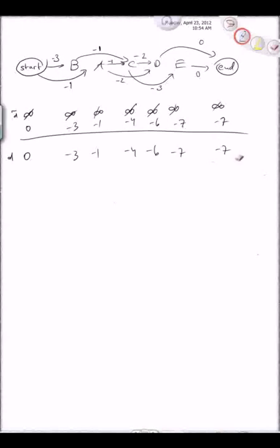But somebody could come along and ask you a few other questions. So for example, they could ask you, what's the earliest time to complete task C? To answer this question, we'd need the longest prerequisite chain from start to C. But we already have that right here. So we know that the earliest completion time for task C is 4. Similarly, the earliest completion time for task D would be 6, and the earliest completion time for task E would be 7.